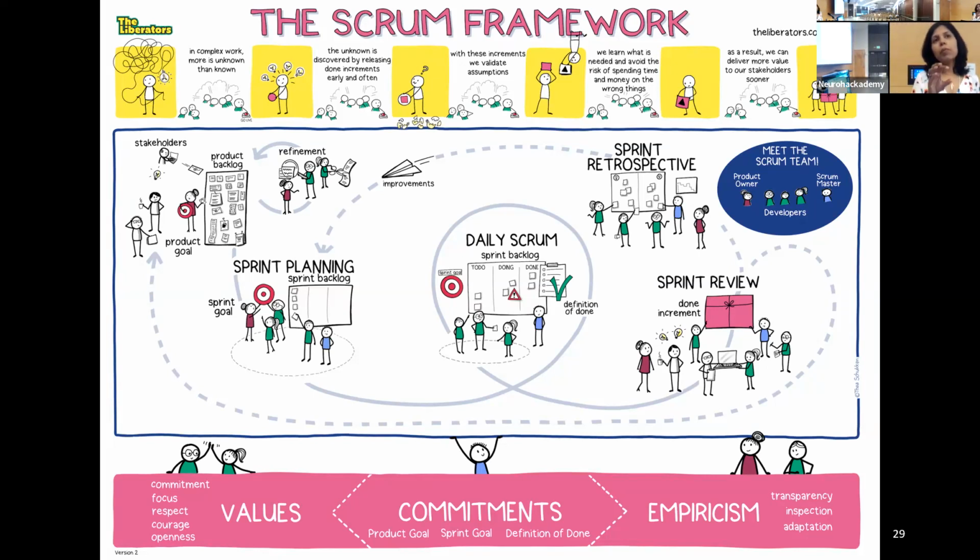that's important. But more importantly, this backlog-based approach of planning, estimating. I don't know if this cartoon goes into estimating at all, but when you create that product backlog, and I'll go into some of the tools, some of the tools actually give you easy ways of providing some of those details. When you create that product backlog and when you create that sprint backlog, you assign estimates to it. They're called story points. Oftentimes they're in these Fibonacci increments. So it's like 1 day or 2 days or 3 days or 5 days.